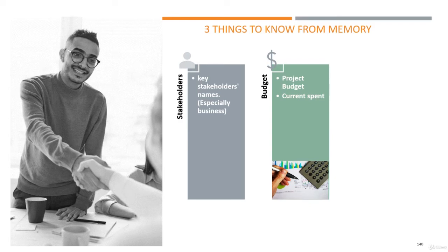You might know this one anyway, but if you know the current spend, and you want to be a bit more detailed, you can be a little bit more granular: we have 12.5 overall, and 6 million for procurement. Looks like we're going to meet that no problem, but the 3 million for something else, we are a little bit behind, but we should be fine by the end of the project. If you want to be a bit more granular, but once again, the more information that you provide, the more you open yourself to being inaccurate.